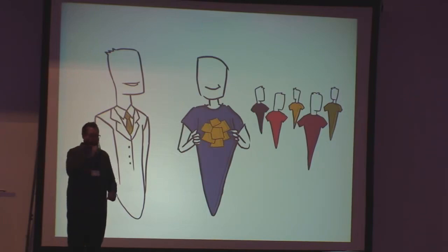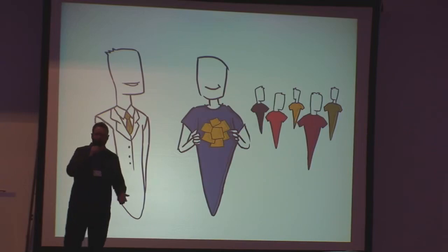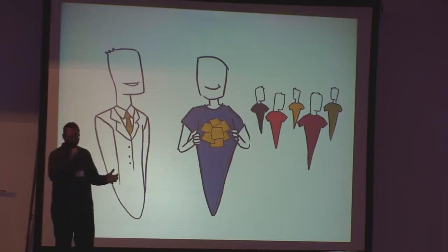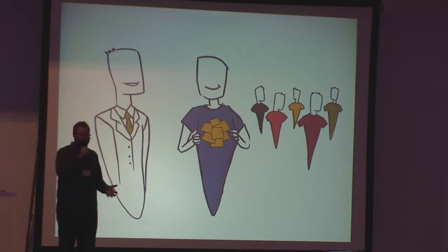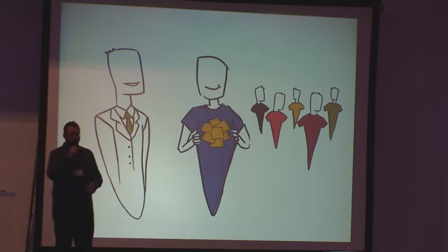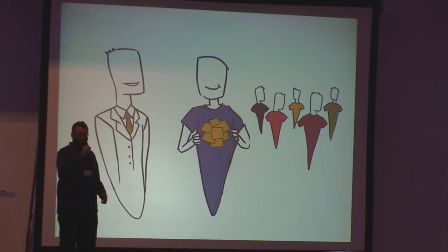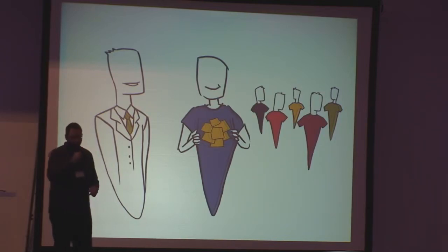One hard rule is that the Scrum Master cannot also be the product owner, because you would now have a conflict where the person dictating, this is what I want you to do, is also the one who's supposed to be making sure the process is going smoothly and the team is being protected. You might have someone just saying, oh, you guys should be able to do twice as much work this sprint as you did last time, and twice as much the time after that.